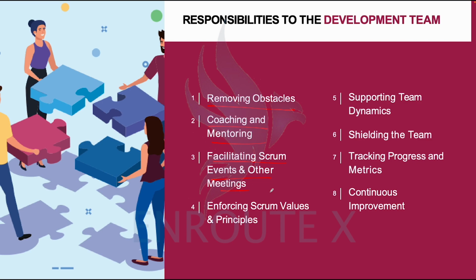Your team members should be able to self organize themselves in the course of the daily stand up, whereby after a while the Scrum Master should just be joining and should just observe the developers run their thing. I've mentioned in previous classes that the daily stand up belongs to the developers. That is one of the questions you could meet in your certification test.